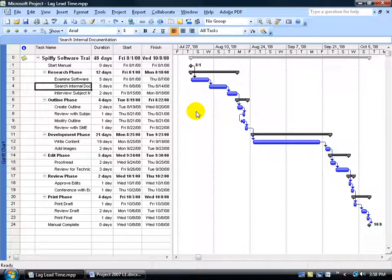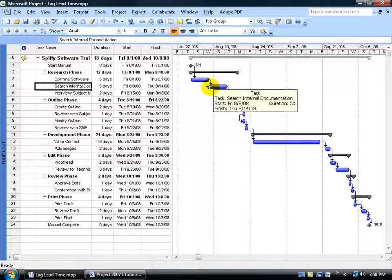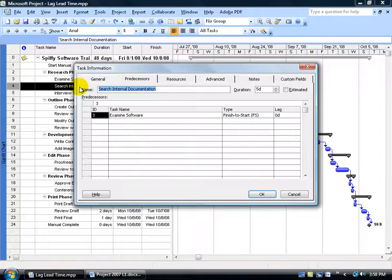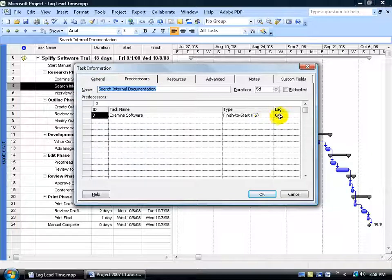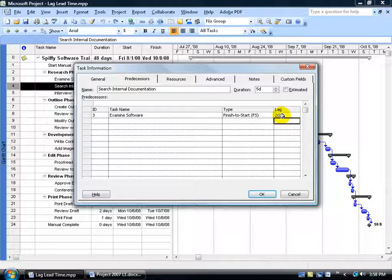Right now I want to add some lag time between these two tasks. What I do is I look at the successor task here and come over and double-click on it. Go to the Predecessors tab, come over to the lag time field and type in your minutes, hours, days, or weeks. I'm going to do 2 and hit enter. By default it's 2 days. Click OK.